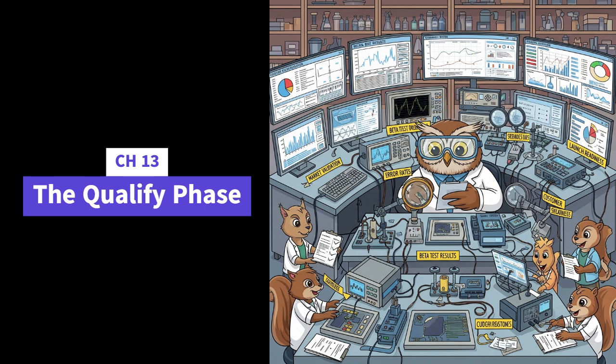And I see here that the launch plan itself might get tweaked now based on market validation learnings. That's exactly right. Those insights from testing, or maybe feedback on system readiness from other teams, it might mean you need to update the launch plan. Like adjusting the budget. Or timeline. Or budget, or timeline, or even refining the KPIs you'll track after launch. Yeah. It needs to reflect the latest reality. And what's the main goal here? The key thing that needs to be done by the end of marketing launch prep?